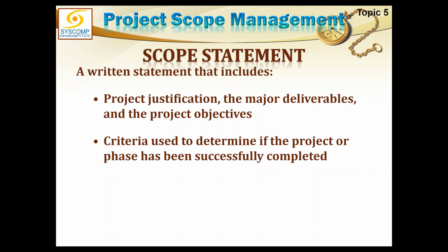and the best approach is selected, and then the best approach is further divided into phases. Every phase is allocated the responsibility, and what are going to be the deliverables of each phase, who will be responsible for doing that, and what will be the criteria of success for each phase. So all this has to be defined in the scope statement.